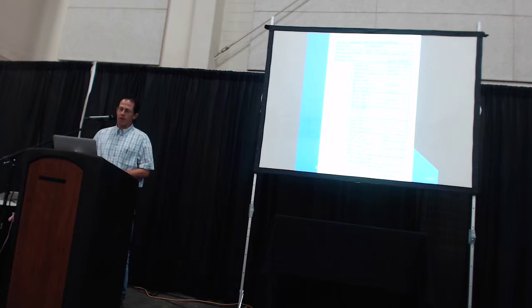And with the WEAP analysis, the designer determines whether or not the pile can be driven with that hammer. So this submittal needs to be done before the hammer's brought to the site, because if the WEAP analysis shows that it cannot drive the pile, then we don't want the hammer to already have been mobilized and on site.